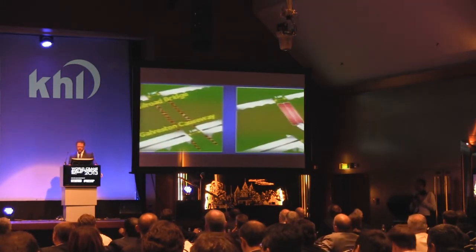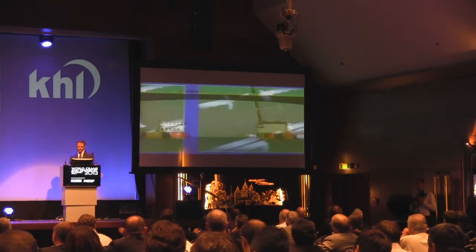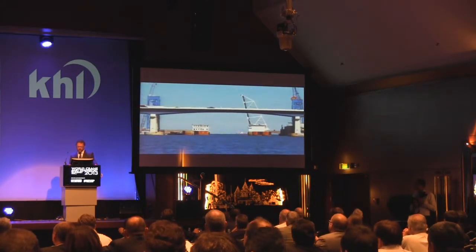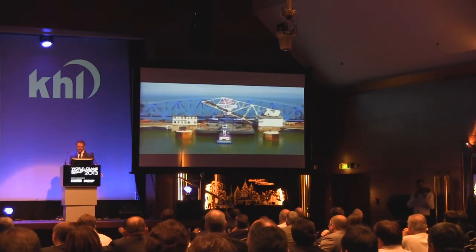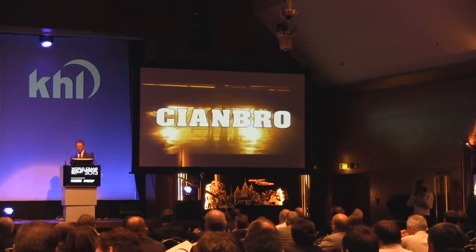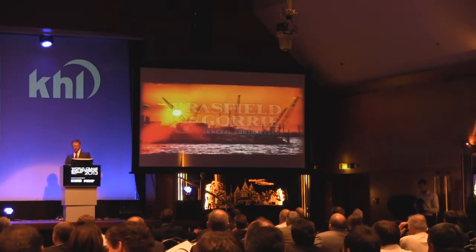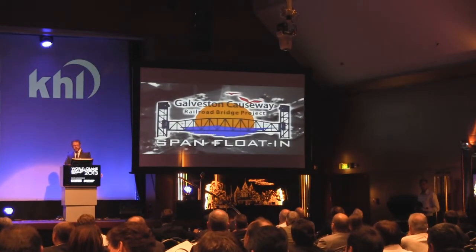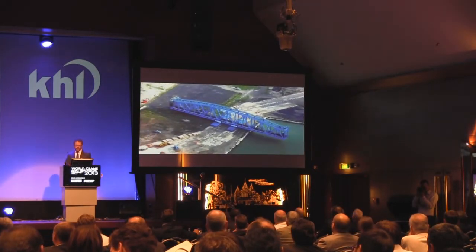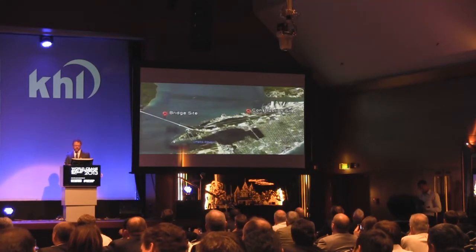The U.S. Coast Guard deemed the bridge a navigational hazard and directed the bridge to be replaced. The highway bridge was widened to a 310-foot clearance, and it was deemed the railroad bridge would be widened to the same distance, nearly tripling its overall width. Zachry and Brasfield & Gorrie came together as a joint venture and won the contract for the bridge replacement. Due to the size of the bridge and the location of its final destination, the new single-track vertical lift span bridge was constructed on land at a site approximately 3 miles from the channel.